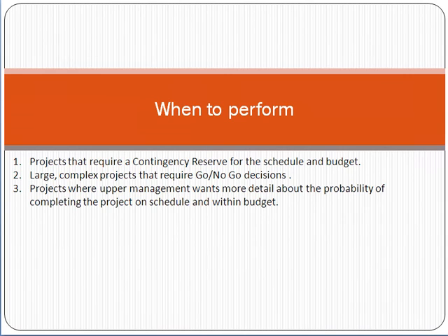When can we perform quantitative risk analysis? For projects that require a contingency reserve for the schedule and budget, and large and complex projects where upper management wants more detail about the probability of completing the project on schedule and within budget.